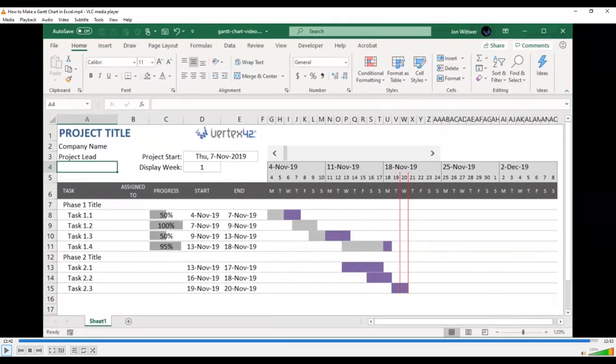This is one of the easiest ways to plan your Gantt chart by yourself. Okay, this is like you are recreating Microsoft Project. Well, in Jira, the Gantt chart is basically an add-on. So yes, you can plan your tasks, and after planning your tasks, Jira also does almost a similar thing. So here, what you're trying to do in a snapshot, if you look at the whole project progress, you are getting a complete idea of where do I stand today, how many tasks are completed, how many tasks were supposed to be completed. So if I'm on 20th November, all these tasks should have been completed to 100%. But if not, then I'm lagging here.